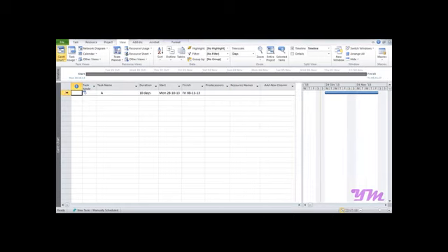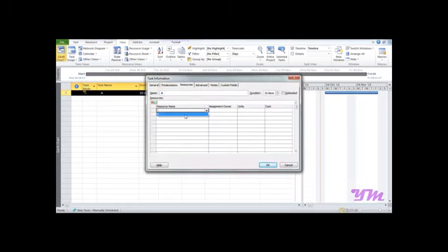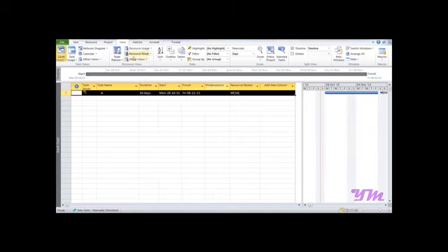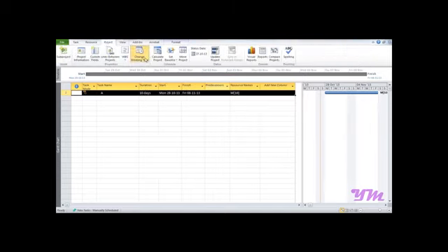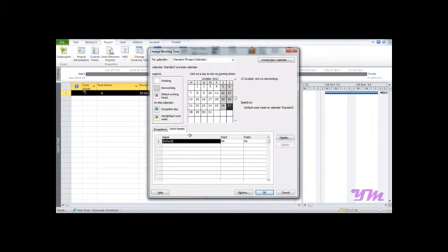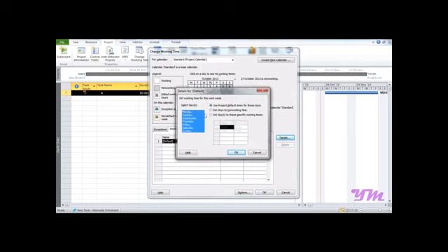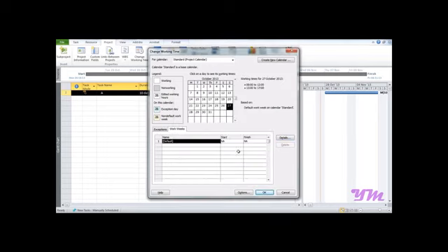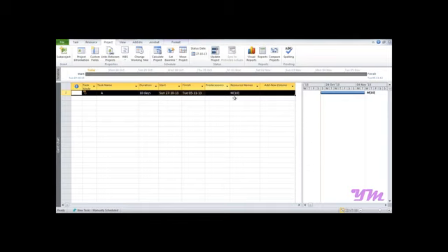then we will go to the Gantt chart view, double click over here and add the resource, that is M having units 10, and click on OK. And to simplify the work, we will make the working time all 7 days a week. So go on to work weeks, details, select all the days, set specific time and click on OK. So all 7 days of the week are now working and we have a project which lasts for 10 days. Then we need to click over here in the project menu, that is set baseline, and set baseline.